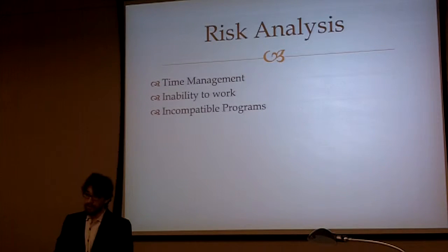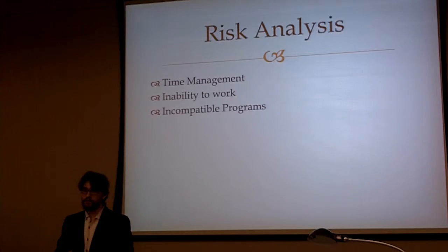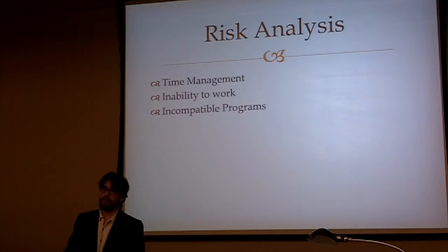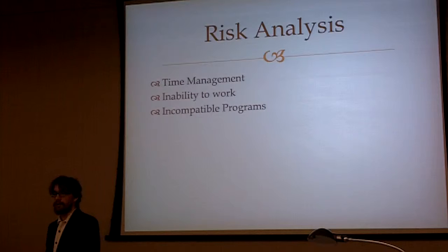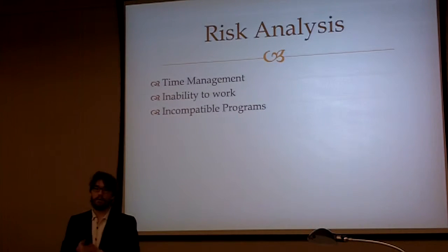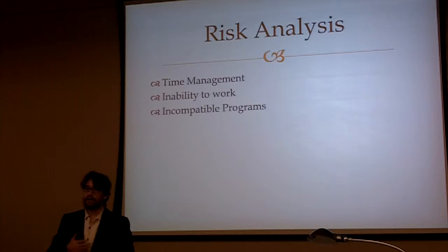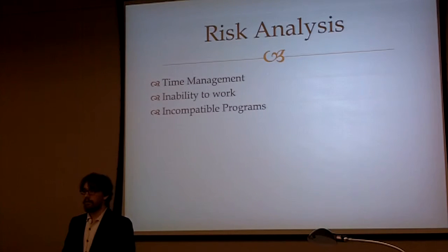If there is a planned absence, such as a vacation or an out-of-state wedding, the user that is leaving is expected to do their work prior to their leaving. If they're unable to do so, as if it is the end of an iteration and they don't know what is expected of them, the two other people will work an hour and a half each night in order to get the work done, and then the person who left will come back and do extra work in order to catch up and do a fair amount of work for the project.